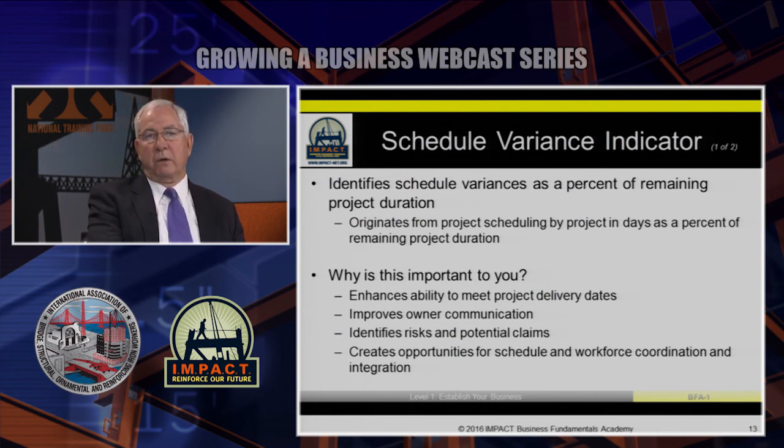So we saw a contractor that used what we call a planning charrette process. And what they did at the beginning of that process was to get all the key players involved in the contract, the owner, the architect, the engineer, general contractor, and all the key subs. And they all sat around a table, and for 2 days they worked on the project schedule. And they worked on constructability issues, resolving problems with design, resolving problems with architecture. Lots of decisions had to be made. But at the end of the process, all of the contractors walked out and had signed the schedule that they were committed to keeping. And how well do you think that project was executed? Quite successful in that particular case. And most contractors will tell you to the extent they spend more time planning, scheduling, and coordinating up front, it is invaluable in terms of project execution and making the project execution successful.